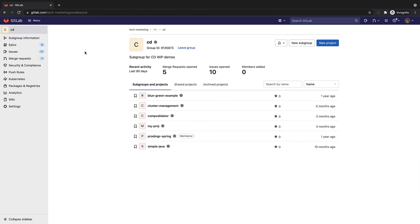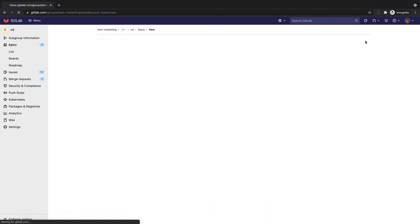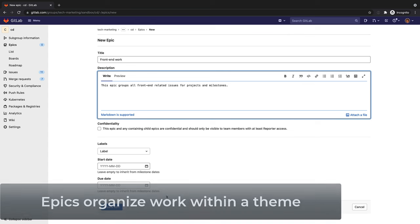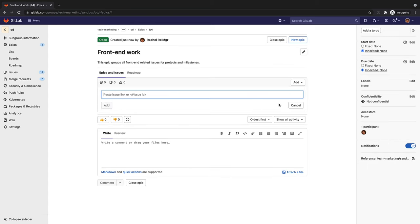To track groups of issues with the same theme, she creates two epics, one for the UI related issues and one for the server side issues. She assigns the UI related issues to the front end work epic and the server side issues to the back end work epic.